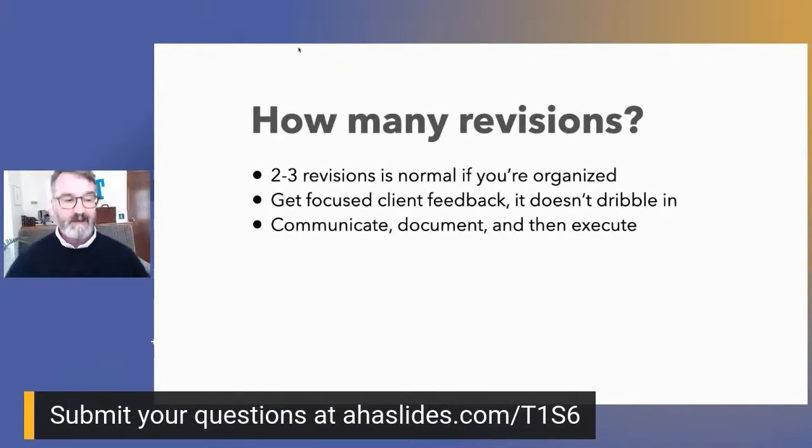How many revisions are we talking about? This is actually a really important question. What I find is best is you're doing two or three revisions. That's a pretty normal situation if you're organized. I try to get focused feedback so that it doesn't dribble in. If you don't keep the client focused on the feedback and you allow them to give you pieces here and there as you go, then there are several problems. One is you can go way down deep in your programming, and then they come back and say, oh, and then you've got to tear everything apart and rework big chunks of your marketing program. So don't let the client keep coming back with new suggestions. You want to have defined that already.